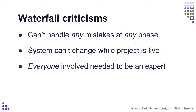People needed to be able to account for mistakes so that they could release better products. Another problem with Waterfall is that it assumes nothing will change in the system while it's being developed, but in the real world there are changes to systems all the time, and so by the time the requirements phase launched, the system being automated had already moved on. Finally, there was the problem that arises with bigger, more complex systems. Because there were huge amounts of information for people to explain to software developers, it was very easy to make mistakes, and it was almost a requirement that developers be experts in how the entire system worked and how every single piece interacted with every other piece of code, which was just impractical.